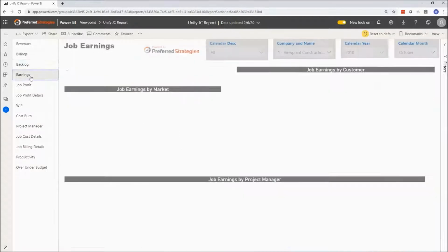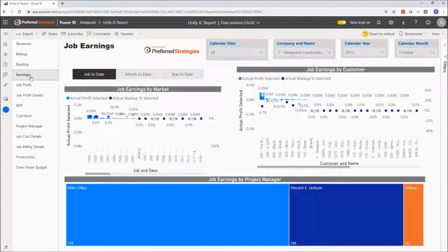The other thing we're doing is creating additional things that don't exist. So that's that data governance. Every transaction system has essentially billing details and cost details, either the estimated contract amount or the estimated budget for cost. But what you really want to analyze are variations of those revenues and costs. So backlog, profit, earned revenue. Those things are built into the data model.